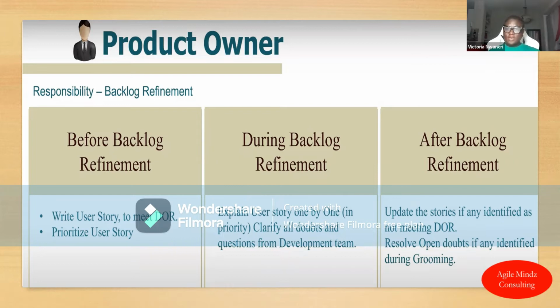So estimating that story, and if it has big points, we can go ahead and break it down, identifying some of those dependencies, risks, and complexity within the story, so that we truly know we have a good understanding of that user story.